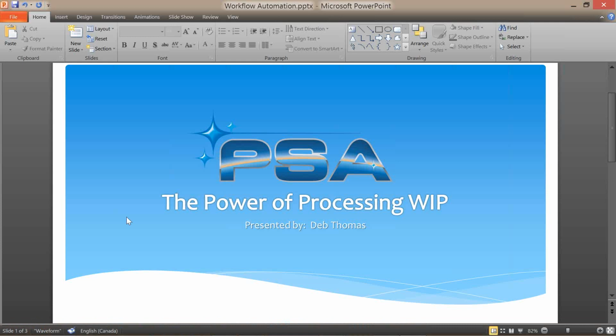Okay. Internal CAT codes. They have a dump trailer, and they bill this equipment to each job at a daily rate. Should this be its own work order to post against WIP? Absolutely. You don't have to do it through a work order, but you want to post the cost.